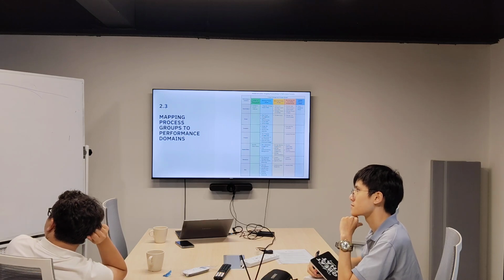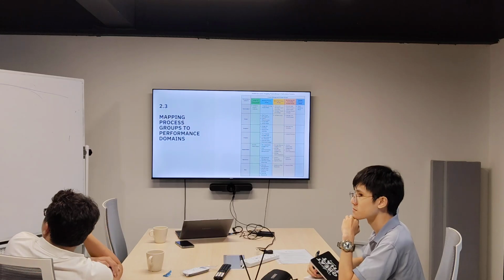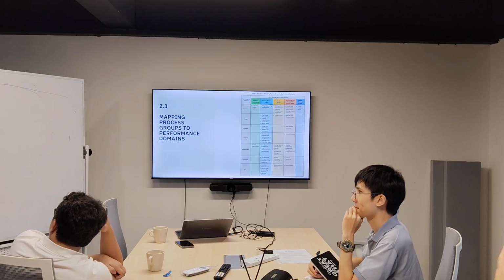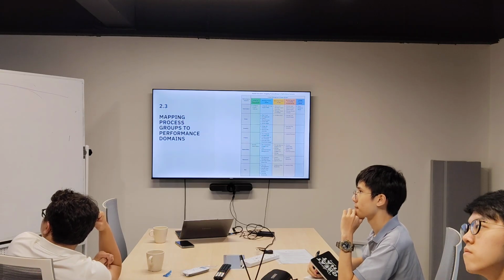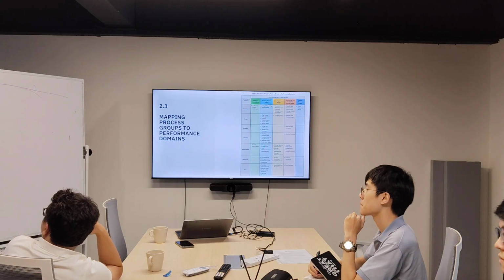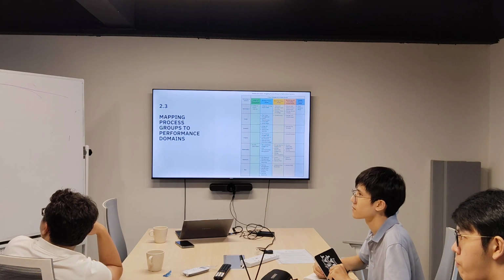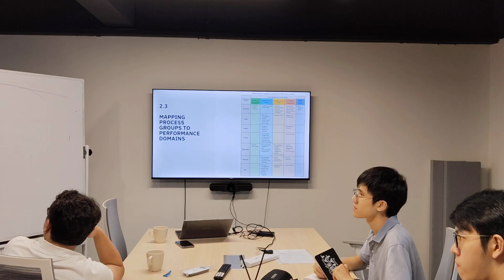Malaysian policy, if not mistaken, under the public area, if you do not apply for a permit, you cannot gather all the people. If you want to organize a talk in a public area, you need to apply for a license from the police. Or if you need to rent a stadium, you also need to apply for a permit from the police. You cannot simply gather all the people in the stadium or in the open area. So you need to know what the policy is.